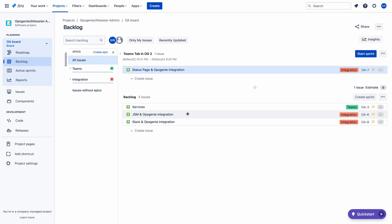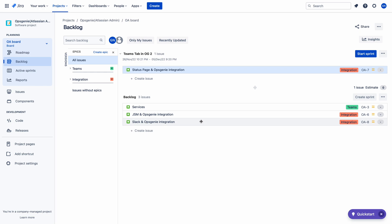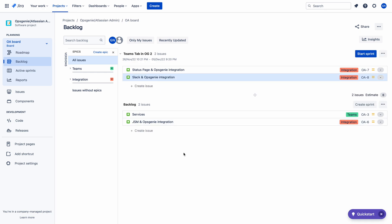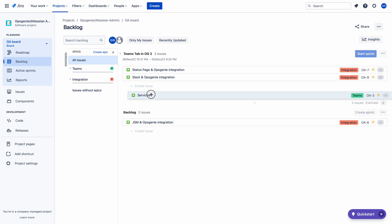I need more time to prepare the JSM and Obsession E video because I have not yet discussed Jira Service Management. Therefore, after discussing JSM, I will create that video. So I won't move it to the sprint now. I can integrate Slack with Obsession E — there's no problem for me. Let me move the Services issue also.